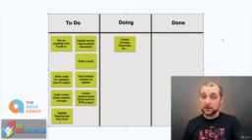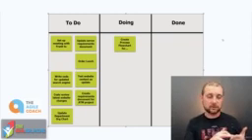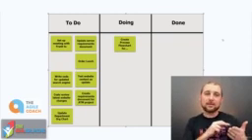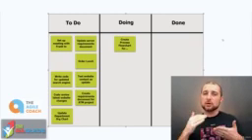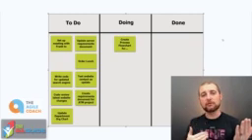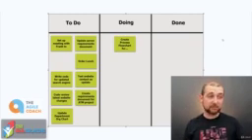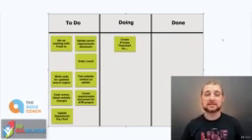When they create the initial card and they put it in the to-do column, they do the same thing. They write the name of the person that created the work item, that particular card. They write the date and the time, and that it's a status of to-do. So when you look at the back of those cards, you can see the audit trail of what that card did from date to date or over time, and kind of see how that card evolved and moved through the various statuses. So I've taken ownership of that particular work item.